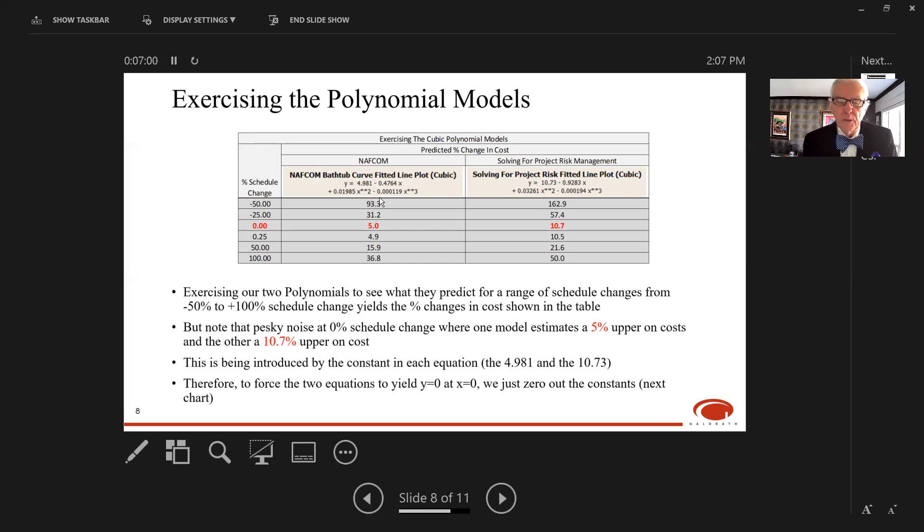If you study those equations, you'll see what's going on. It's just the constant term coming into play. In the left equation for NAFCOM, we have a constant term of 4.981, which gives us that five percent, because at X equals zero the rest of the equation zeros out and we're left with just that constant term. Same for the polynomial on the right with constant term 10.7. Our problem is being introduced by the constants in each equation.